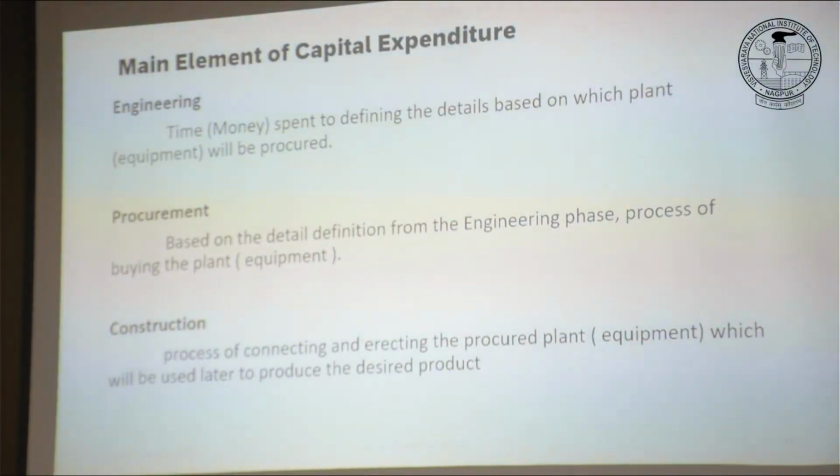Right? So like you were doing this calculation, what is the molecular weight of CO, what's the molecular weight of hydrogen, how much I will need, what's the typical specific volume required, that's the volume of reactor I need, all those calculations that you need, that's all called engineering. So the total TIC is split into these three parts, normally called EPC: engineering, procurement and construction.